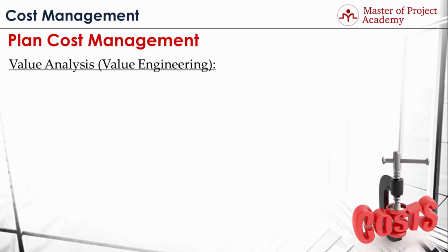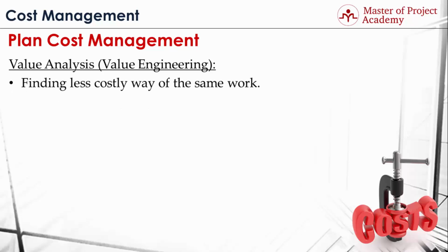Now we will go over value analysis. Value analysis is also known as value engineering. Value engineering is, briefly, finding a less costly way of doing the same work. Please do not confuse this with reducing scope or decreasing quality to deliver project work with a lower cost. Value engineering aims to do the exact work in a less costly way.